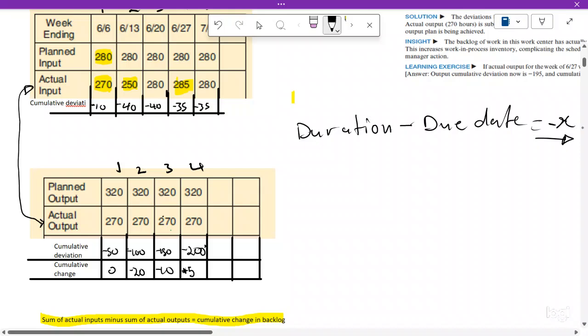So this formula is going to be very important at a later stage. Sometimes they might make it due date minus duration, but I think it's due date minus duration. Then if you get negative, that negative we do it as an absolute, but it doesn't mean good stuff. It means bad stuff, meaning that you are being delayed by that amount of days.